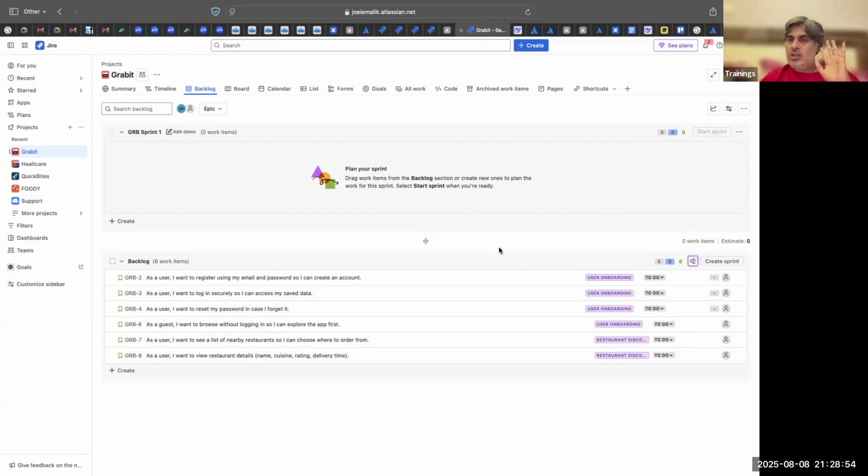There can be negotiation. People can say, okay, this is easy. This is a complex one. We will not be able to complete it. We'll do it next time. That also PO can decide, whether he's allowing or not. But the first point you have to notice, in the sprint planning, out of these 6 stories, the list of stories which are ready for development, that list you need to have after the grooming call.